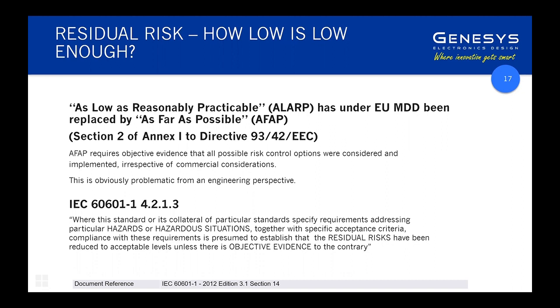So what it really means is, what it's intended to stop is people taking economic considerations into account and saying, we're not going to reduce risk further because it will make the product X% more expensive. Even that has been challenged within the EU, because there is an EU directive that requires medical technology and therapies to be cost effectively available to the general public. So to my mind, this as far as possible thing is a bit of a can of worms, and it does cause angst when saying, well, how far do we reduce risk?